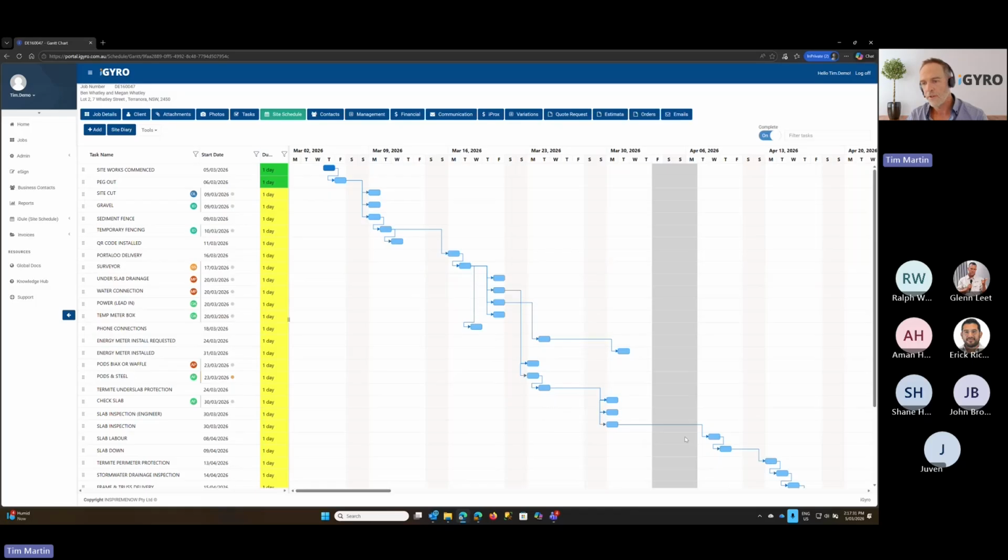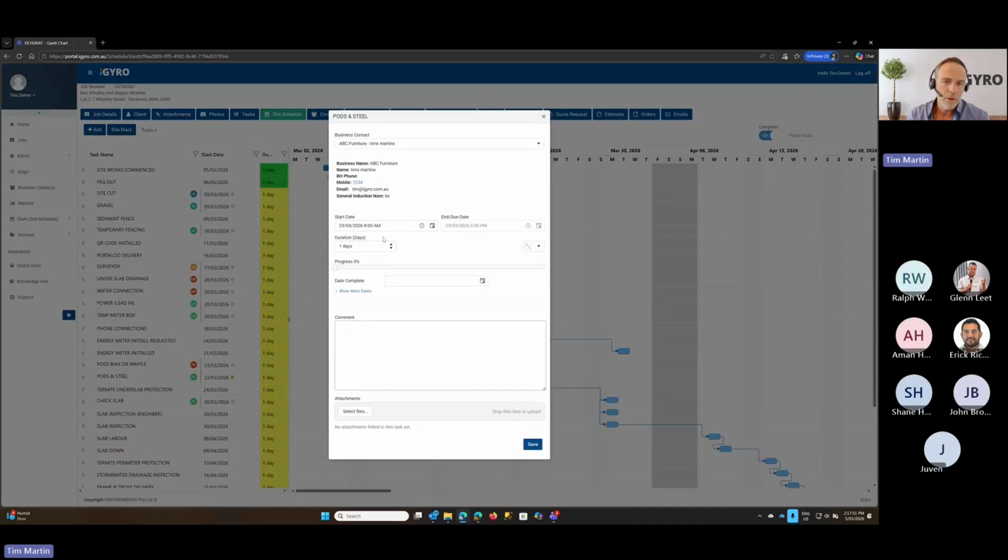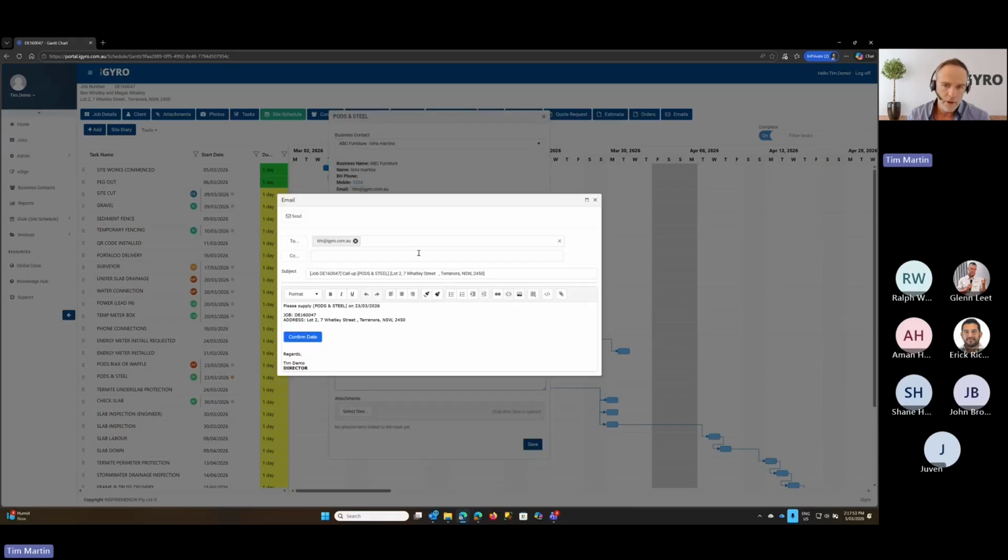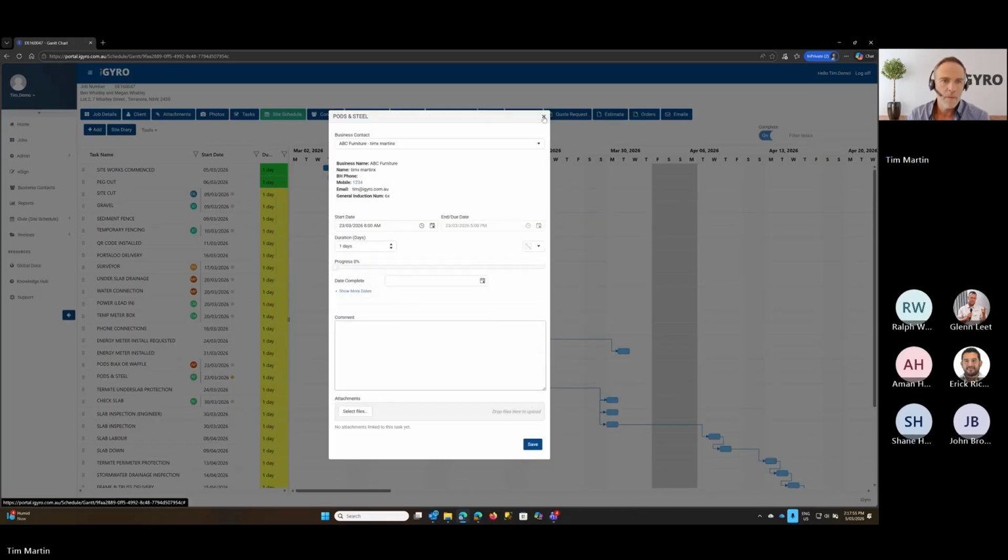Okay, so all of those dates have changed all the way down, and this one's gone back to needs reapproval. Alrighty, so when the suppliers log in, they're going to see that something needs reapproval, or there's a new date that's changed. You probably also want to let them know too. So you can always do your normal call-ups from here as well. When the date gets close, you do your call-up process.